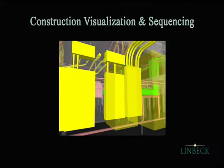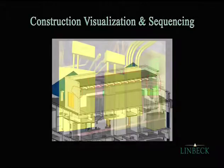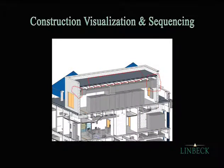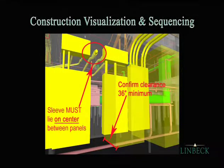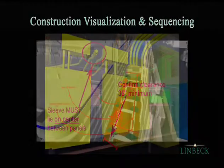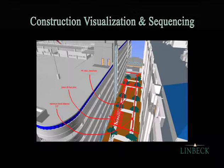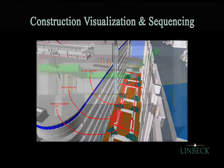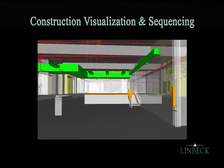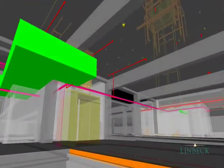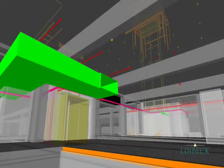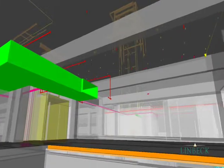BIM allows significant advances in construction visualization. The model is often used to clarify design intent in discussion with the design team or to communicate complex installations to work crews. The model is used to investigate constructability issues, especially regarding site utilization in three dimensions. The model is also used to illustrate installation sequences and visualize the schedule, thus creating a 4D model. This can show very small, specific areas or large, big picture scope.